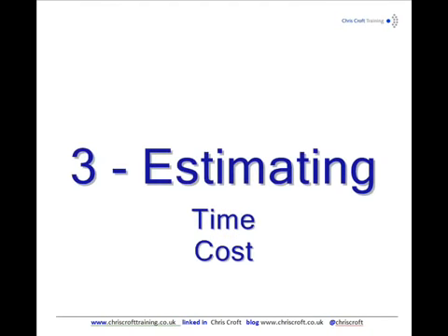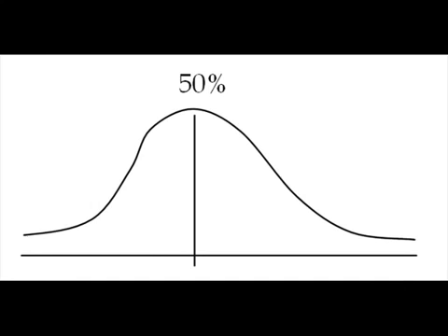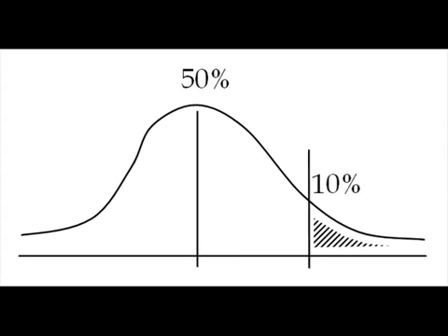Think about how long they're going to take and what they're going to cost. And don't promise the average, because if you promise the average, there's a 50% chance that you're going to fail. Ideally, a good safety margin would not be just adding 10%. You'd add a bit more than that. You'd go halfway between the average and the worst case. So if you expect something to take 4 weeks, but it might take 6 weeks,